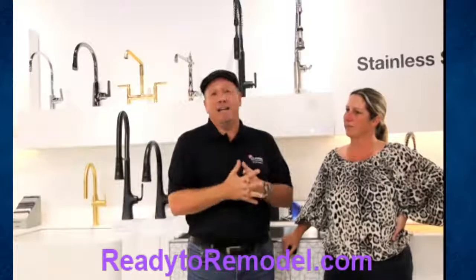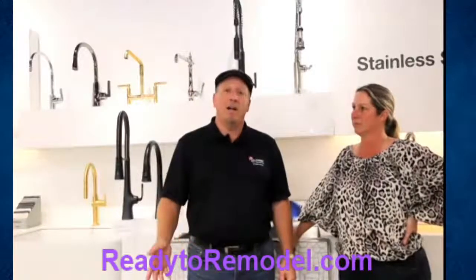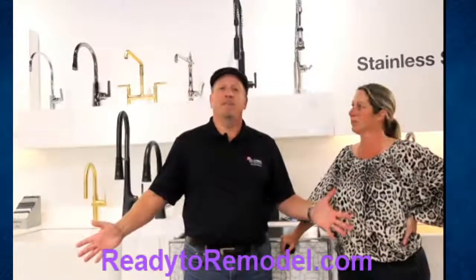But what if the project's bigger and you want to do something? Well, there's basically three ways to handle it. In California, you have to have a licensed contractor. It's the rules. If it's over $500, you need to get someone licensed in their trade. It's also a very good idea because we're talking about plumbing and water, and one wrong move and you could ruin your whole floor. A new faucet could all of a sudden be a $100,000 faucet. You don't want that. So who do you choose?